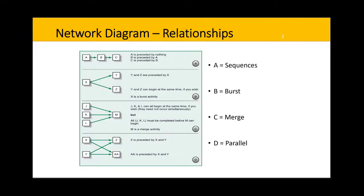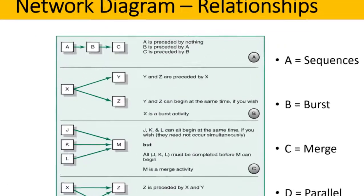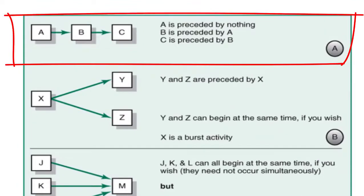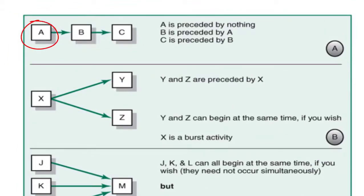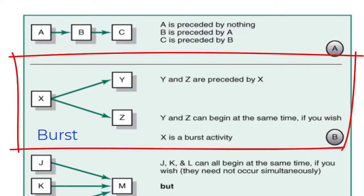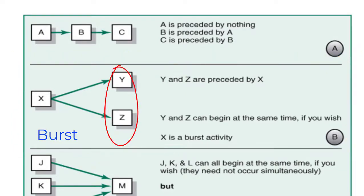Here we can see different types of relationships. A represents sequence tasks: A is preceded by nothing, B is preceded by A, and C is preceded by B. B represents a burst. Y and Z are preceded by X. Y and Z can begin at the same time if you wish, and X is a burst activity, with Y and Z bursting from X.